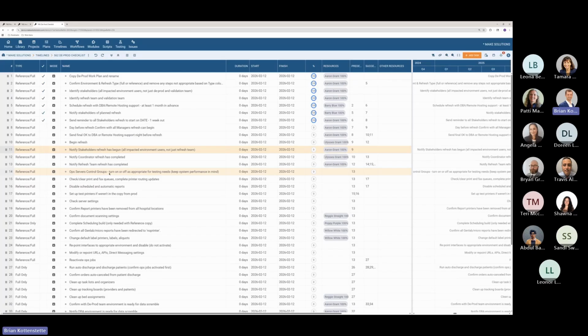Yeah, and we can work with you more too, Sandy. You certainly do get the Gantt view with timelines. As you assign your resources to this, they have the ability to update their individual tasks here. So there is a little bit of overlap in both, but a plan is definitely more like a checklist of specific things that need to get done. A timeline can be a little more powerful in terms of managing multiple tasks, projects, and dependencies, because you can link them as well. So if one moves out, the others will move out. You can have successors and things like that also.